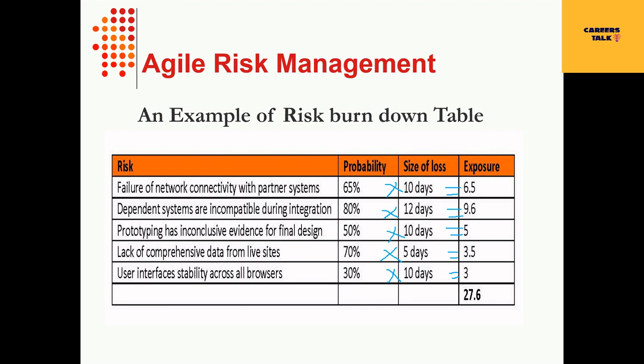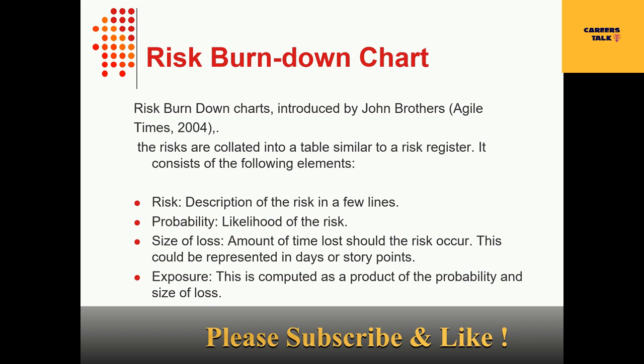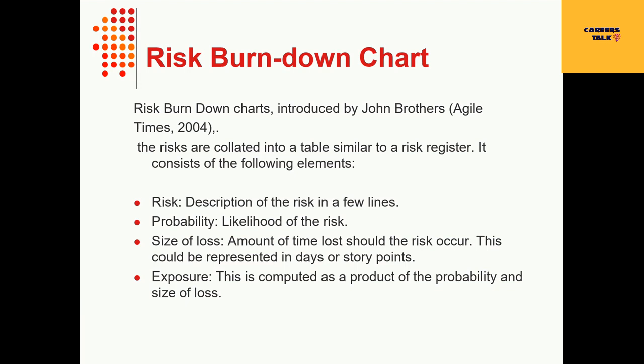Exposure is the product of probability and the size of loss or impact. The risks are collated into a table similar to a risk register. The table includes: the risk description, probability — the likelihood of the risk — size of loss, which is the amount of time lost should the risk occur (represented in days or story points), and exposure, which is calculated as the product of probability and size of loss.